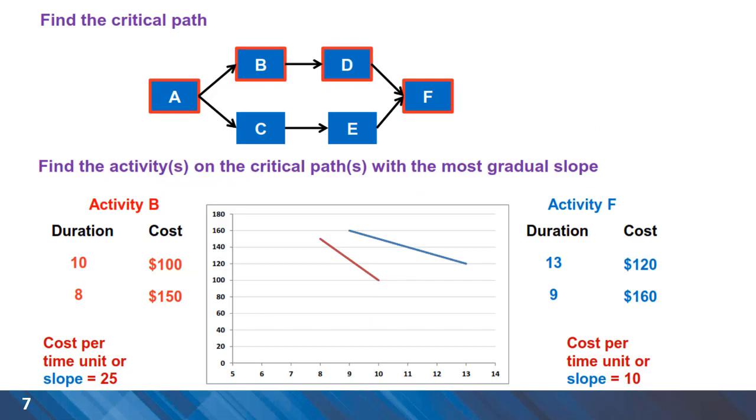Very simple example project with six activities, two of them can be crashed, activity B and activity F. We calculate the slope for the two and the better option here to crash is obviously activity F.